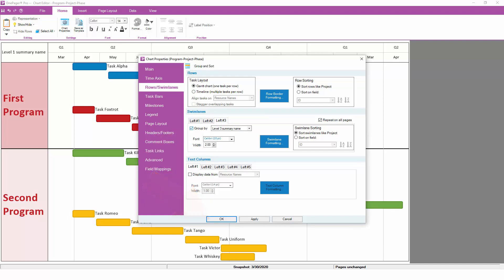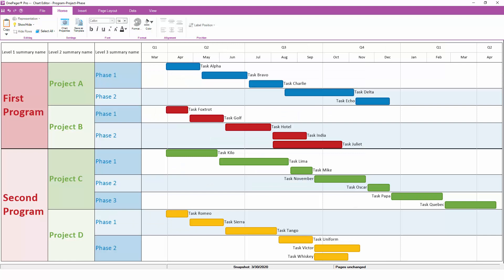When you click OK, OnePager will group your chart three times instead of one. All of the tasks with the same level 3 parent task will end up in the third swimlane. Those swimlanes, in turn, will be grouped into a second swimlane whenever they share the same parent task. And those swimlanes, finally, will be grouped one more time into the first swimlane, again, whenever they also share the same parent task.